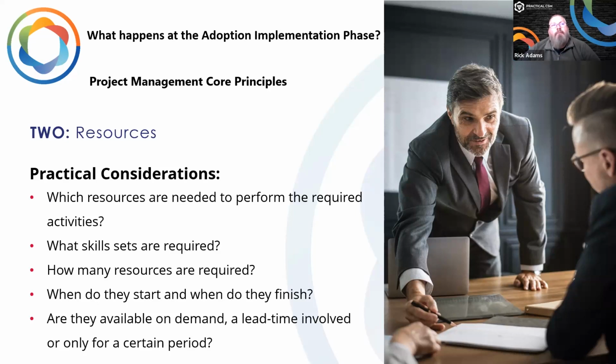So what do we need for that training? Do we need a classroom? Do we need a trainer? Do we need a presentation? Do we need access to the software? Do we need a dummy server with dummy data on it? Or can we use the live one? What are the implications of using the live one? What are the security implications of it, for example? So those are some examples of considerations around resources for training.